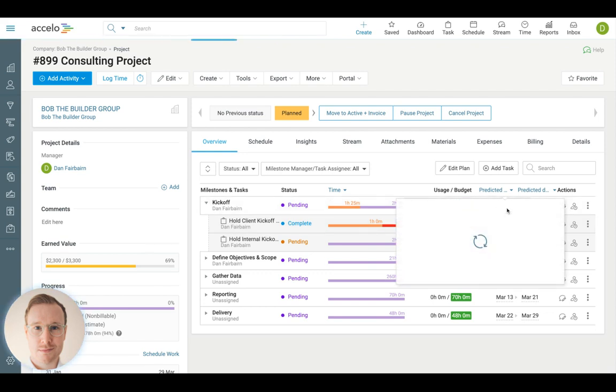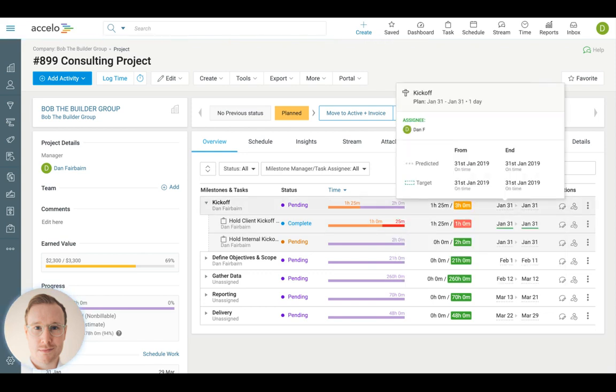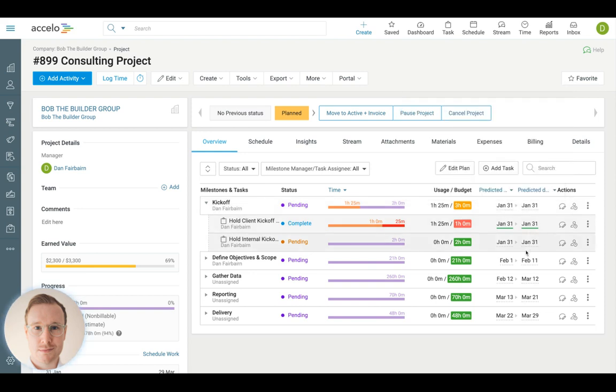As certain milestones are either delayed or perhaps completed ahead of time, you'll start getting information on these dates here showing the change from the predicted time, done automatically by the system, versus your targeted time. Getting simple readouts whether the system believes you're going to be on time or whether it's expecting things to be delayed. And you'll see these dates change and the color grading of them depending on the health of your particular project.